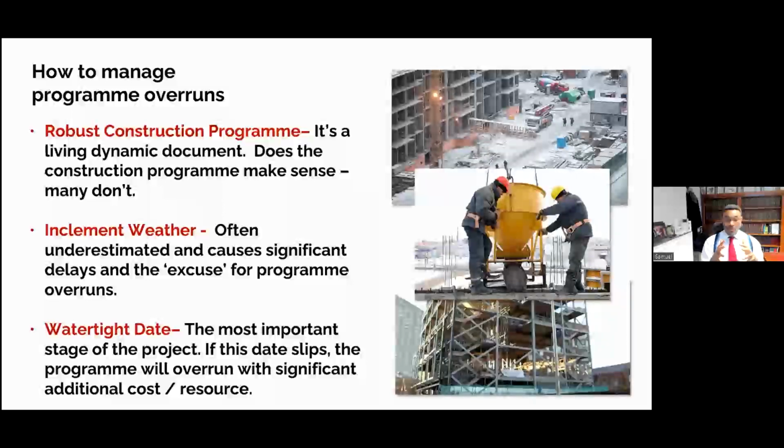You will engage them and say, look, I have to direct my resources to suit. And when you receive the information, so give me a schedule. Although you request that schedule, try and prepare your own schedule as to when you'll be releasing the information. Then, of course, you can compare it and see whether it works. And if it doesn't work, get it changed at the outset, because it's easier at the outset to agree adjustments to program than it is for you to start trying to change them post the event, because then, of course, that's when the difficulties arise.